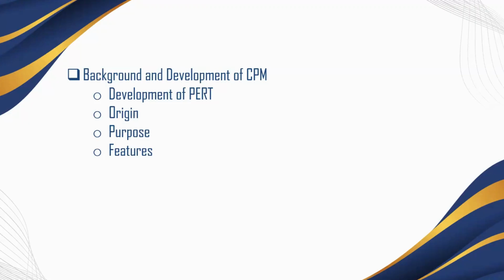Features. CPM is deterministic, focusing on the time cost trade-off in the project management by using a single time estimate for each activity. This approach helps the project manager to optimize the project schedule and manage cost effectively.